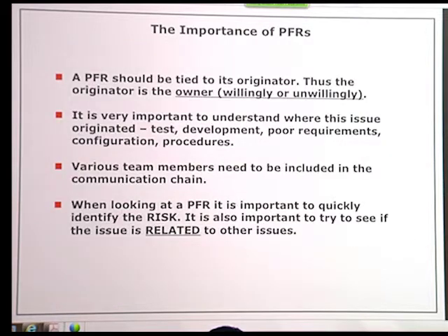And so, a couple of important things about PFRs. A PFR should be tied to its originator. So the person who created it needs to be pegged to the particular issue, whether willingly or unwillingly. It's important to know who originated this. It's very important to understand where the issue originated: test development, core requirements, procedures. And a very important aspect is the various team members need to be included in the communication chain.